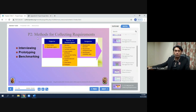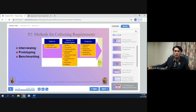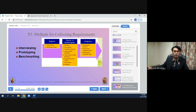Methods for collecting requirements include interviewing, prototyping, and benchmarking. The inputs are the project charter and stakeholder register. The tools and techniques include interviews, focus groups, facilitated workshops, group creativity techniques, group decision-making techniques, questionnaires and surveys, observations, and prototypes. The outputs are the requirements document, requirements management plan, and requirements traceability matrix.